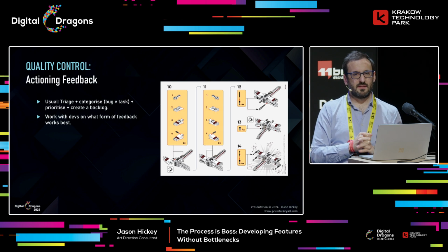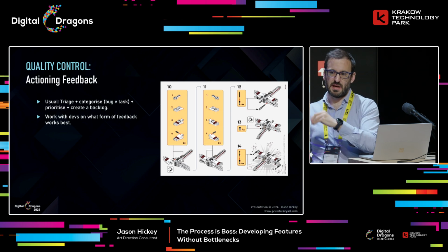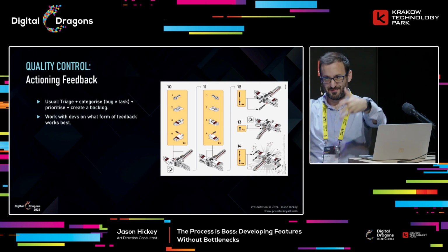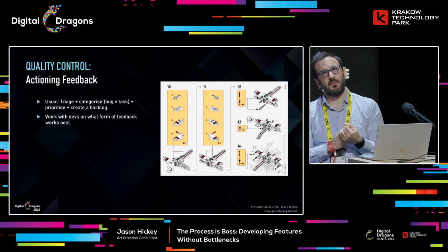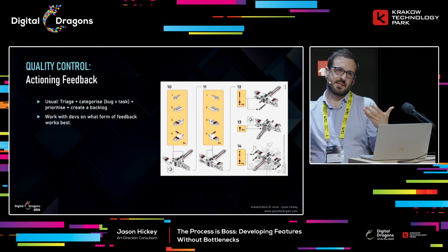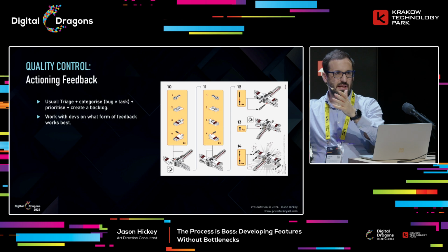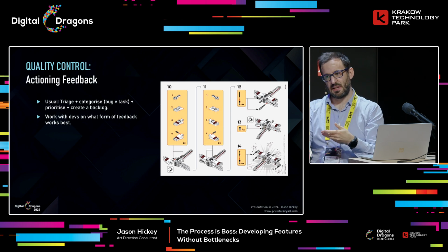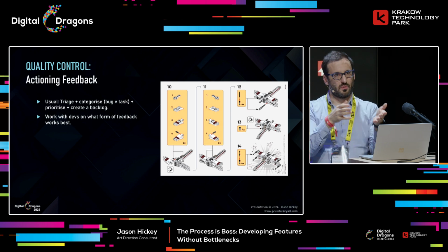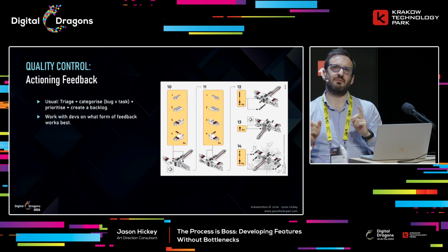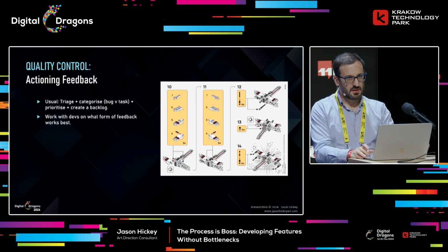But one of the things we do need to be aware of, especially in our neurodivergent world and with inclusivity, is to make sure we're giving feedback in a way that the person implementing the actions is able to understand it and get to it as quickly as possible. So, for example, with the environment art team, instead of having 40 tasks for this block in Manhattan, I would just say, go to tile HG, and in this folder, here are all the images, and I'd use Snagit to write up notes on like 40 images, and then they just go through, do it all in one go, and submit it with one change list, which arguably isn't great, but it's a good way for the artist to work, rather than spending time in Jira.